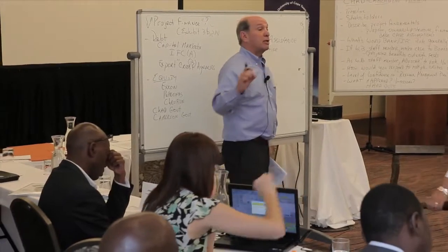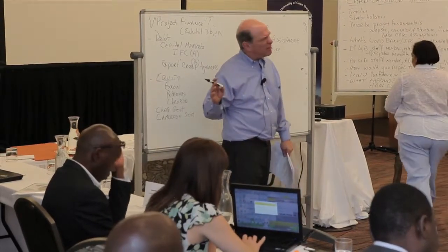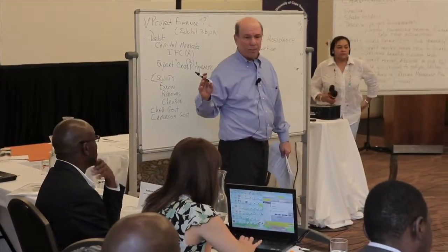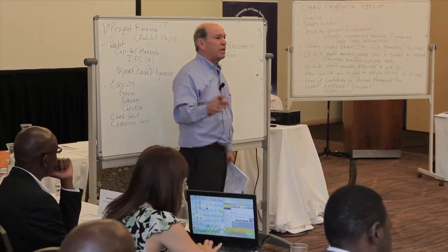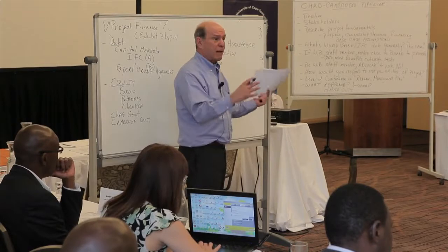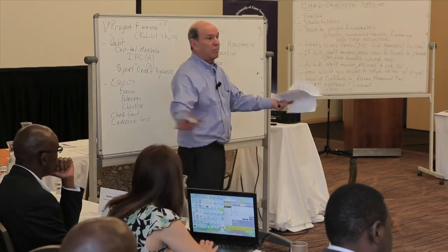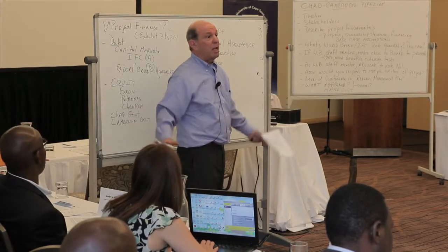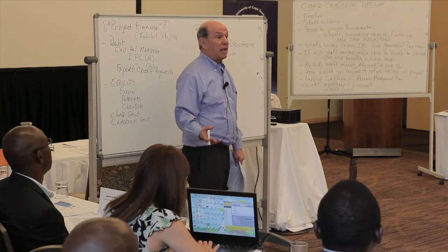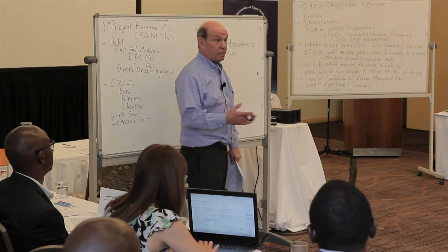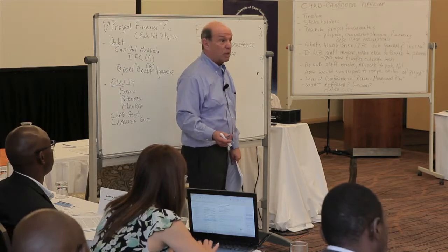So if this project, I don't know, was I involved in this project, did it say? I don't remember if it said or not. But if this project broke down because they didn't find enough oil or because there was an operational breakdown, MIGA insurance would do them no good. If there was a civil war in Chad and it led to the cessation of operations, they would collect an insurance.